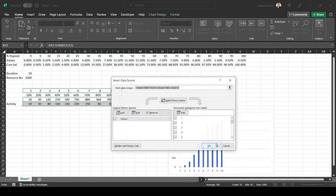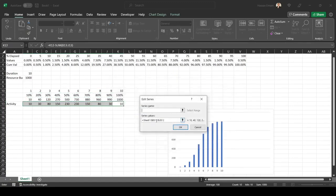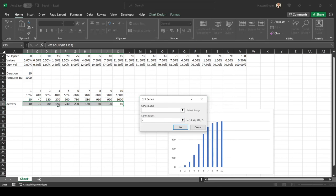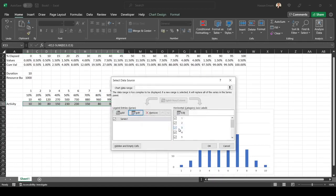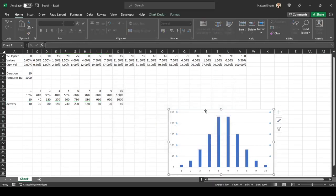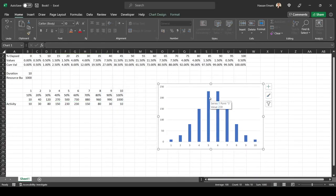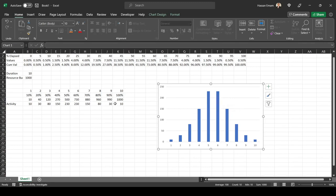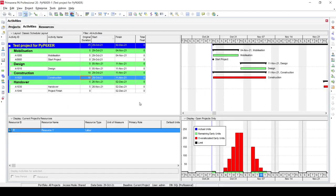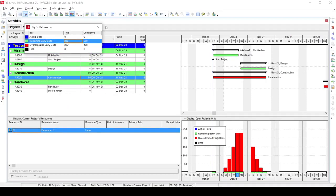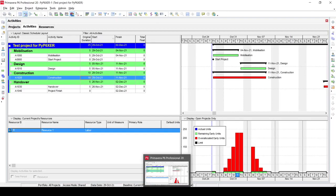In some cases they are, but in the vast majority of the cases, it's a nice to have thing. But I would say it adds a lot of overhead to the calculations of any project. For example, if you try to implement that in Power BI, you will find that the time it takes to calculate is way higher than the time that you use in order to do this calculation if you have a straight line. We'll go into Power BI and look into that later on. Let's check now - the peak is 230, and here we have the peak is 230. So that's how you calculate the resource distribution. You can try it with any other graphs or any other curves and let me know how you get on.